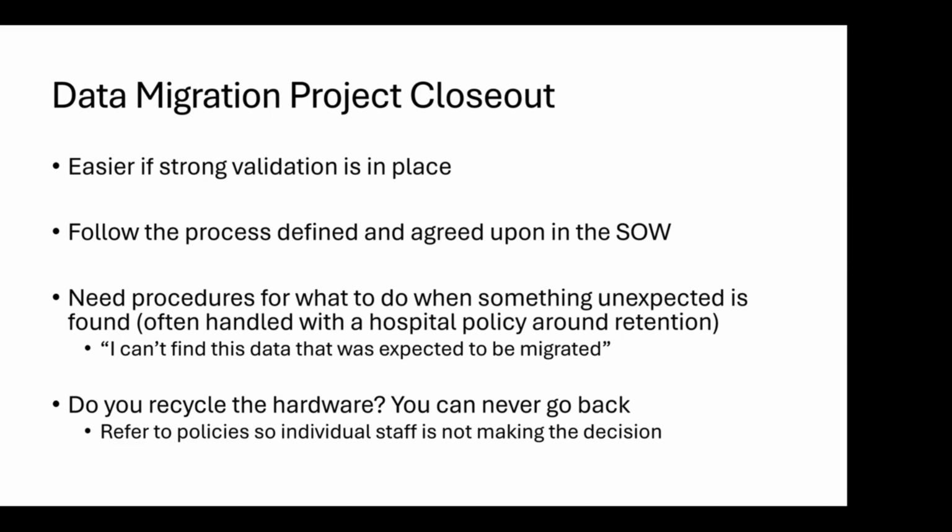The other part of a migration closeout where I think it really, really ends is when you recycle that hardware. There is literally no going back from that. Assuming you get rid of the hardware and the tapes, if you were doing backup tapes back then. And we actually have specific policies about electronic recycling, where the early part of those policies ask for documentation about data migration. So it's a requirement. So we're coming at it from multiple angles, but these are kind of fail-safe, catch-all policies.